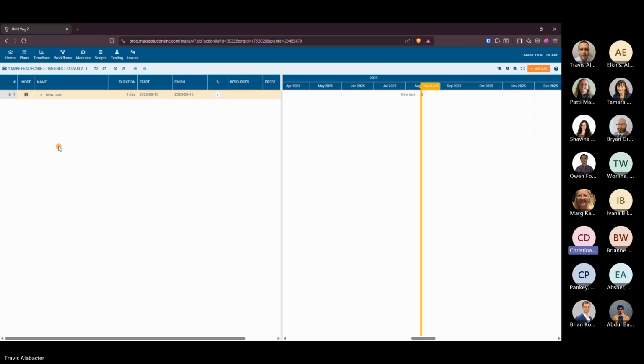Okay, if you have, for example, duration 1 day and then this is the predecessor to something else, does it automatically figure out that you can't start the next thing until the next day? Yep. It does? Perfect. What if I put like 3 days on there? Will it automatically calculate the finish date? Yes. Okay. You can show that, Trav.